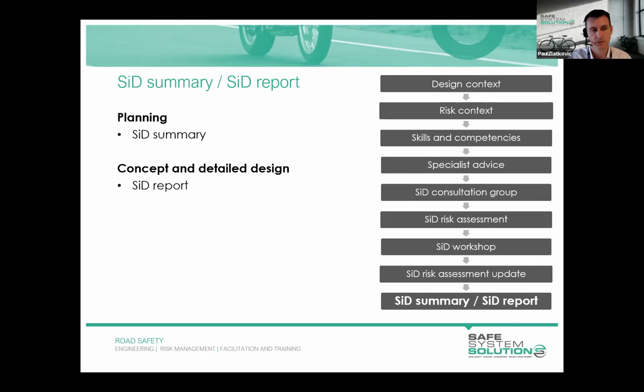Also, if a concept design is prepared internally by council and the detailed design is going externally, then that safety and design report will be passed from the internal concept design to the external detailed design consultant.